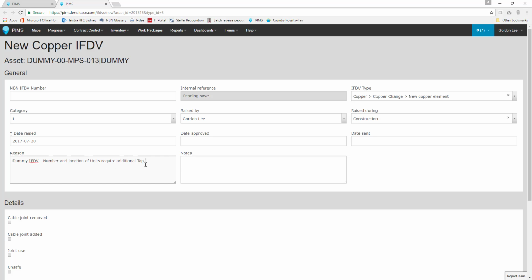The Notes text block should be used to communicate other key details. Again, using brief and clear language, you should include the SORs affected and, if applicable, other information such as the nature of an unsafe design element, relocation details, or other assets affected by your variation.